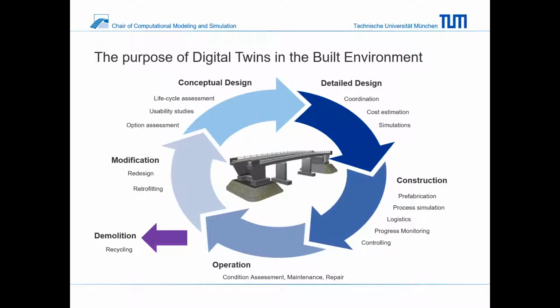In these different phases, we will have typical use cases. For example, in the conceptual design, we will use the digital twin for life cycle assessment, for usability studies, for assessing different options. During the detailed design, we will use it for coordination, for cost estimation, for simulations. Then in the construction phase, we will use it maybe for prefabrication. Very surely we will use it for process simulation, for steering logistics, for progress monitoring of the construction, and for controlling, most importantly, the quality of the facility that we built.